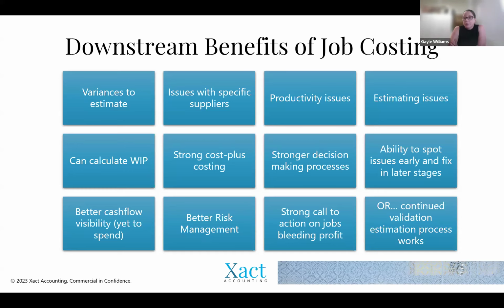Sometimes it comes down to problems with your estimating to start with, and things that you wouldn't identify throughout the course of a job if you're only looking at it at the end of a job. And then you've missed that opportunity to review and learn from those estimation issues and include those on your new estimates. So if you're waiting till the end of a job before you realise, oh no, we've missed this whole chunk on this job, you might have quoted several other jobs with that same error. By the time you've identified it, you're already halfway through 3 or 4 other contracts that you have to wear that cost over and over and over again because you haven't learnt and completed the feedback loop early enough throughout the job.